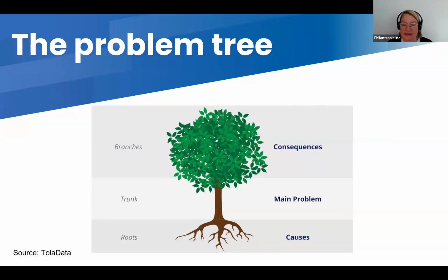So why does the problem exist? In that example with kids swimming, pools were closed. There are not enough teachers. There is Corona, that's why the pools were closed. So you can develop small chains of causes of the problem, and you can level them. You will see another example on the next slide that is a bit more complicated, to show all the connections. If you have lined out all the causes, that might need some research, you should really put your head to it.